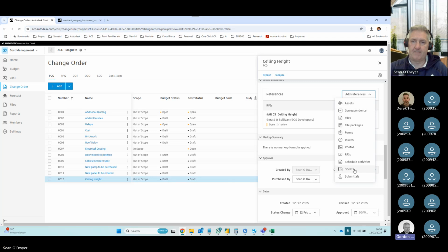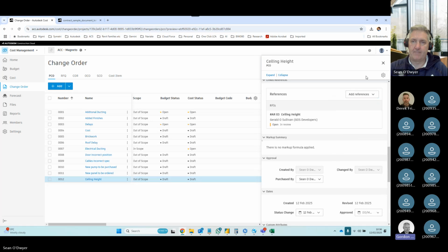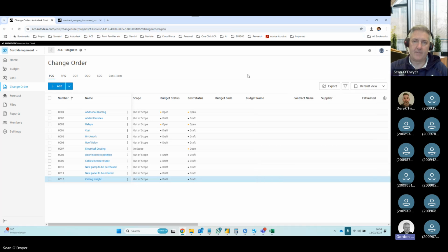Yeah. Good, and I see there we'll be going through later on making their own forms, and then your submittals there. That's for sending out your tender package. It's sending out your submittals for tech submittals, so that what the supply chain are providing to you, they could be samples, spec sheets, any other drawings that they want to be presenting back to you, shop drawings.